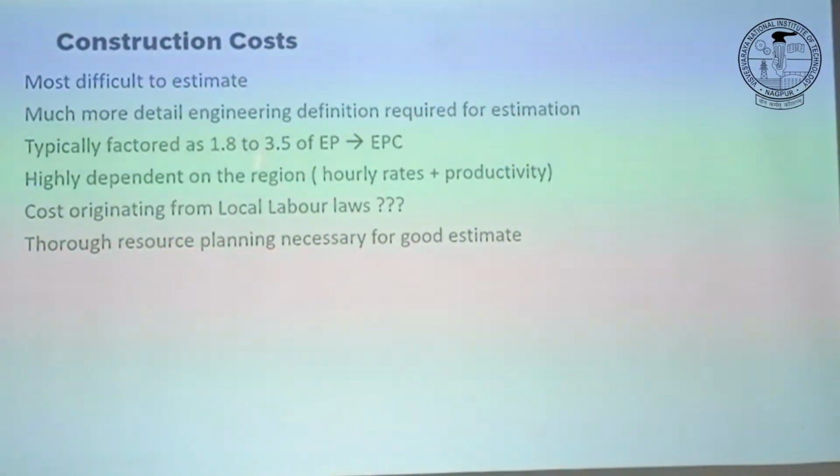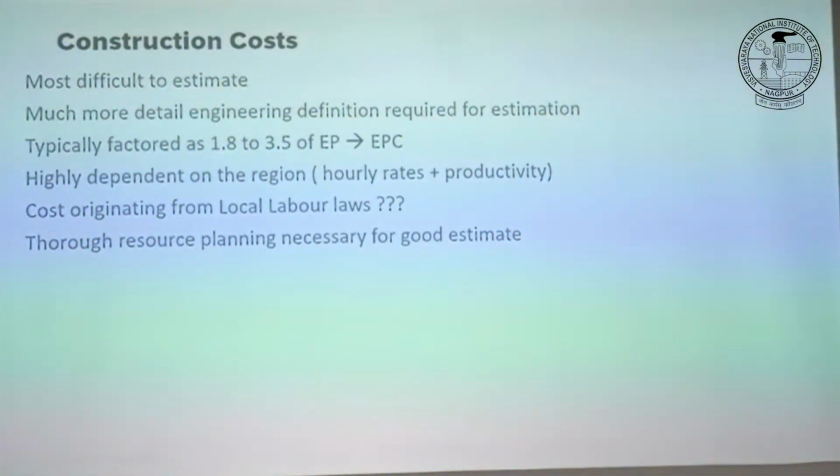Another element of construction cost is the cost associated with dealing with local authorities. So labor laws can influence your construction costs heavily. For example, in European countries, truck drivers are not allowed to drive more than 6 hours a day. There are no restrictions as such in India.